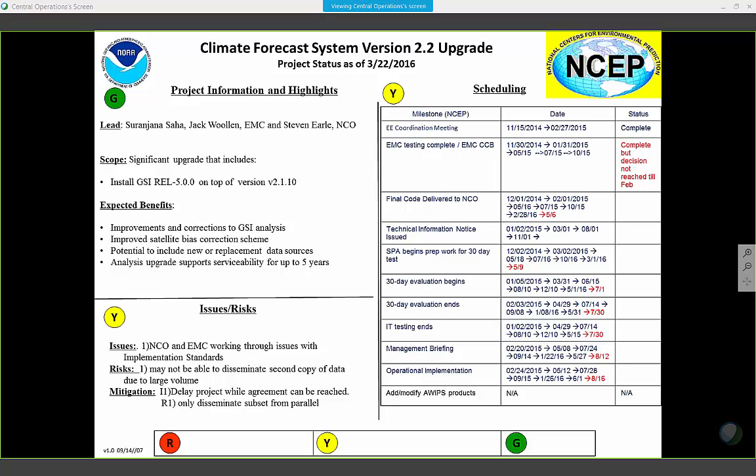Oh, yeah, it goes back to 14 even. Yeah. Well, we had a lot. It took a long time to do those reruns. And then there's some other things, too. I mean, we had the issue with the fact that we had this massive El Nino coming up. We agreed upon doing significantly additional testing. After that, we were not willing to create a potential changeover in the middle of it, so this is not just a modeling issue. This is coordinated between CPC and EMC to deliberately have this slip.